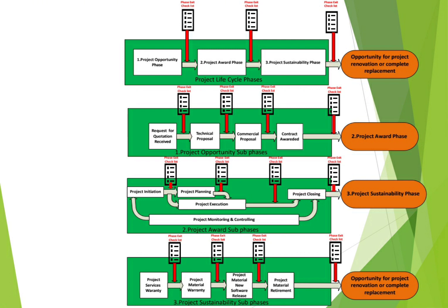You can use your project engineer, or you as a project manager will enter all of this information and start to put the cost baseline plan in the system, where you will identify, based on the estimation sheet or price list which you have, the number of hours you need to distribute over the months assigned for this project. For example, if this project is 12 months in duration, you need to distribute your cost over the 12 months.